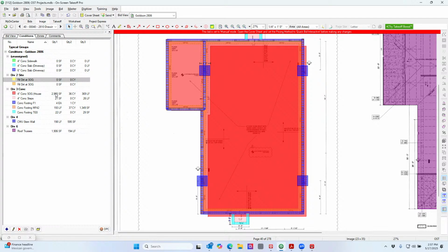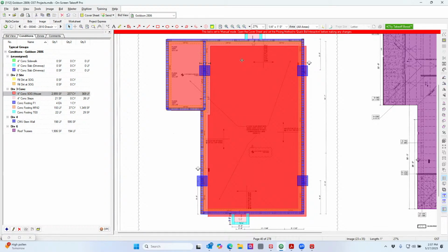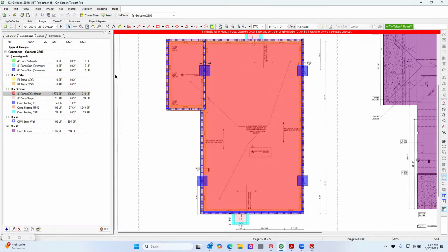But basically we know, for instance, we have about 3,000 square feet, and it's 2 foot 2 inches deep. Let me just do it here real quick. So if I had 2 foot 2 inches, and let me remove this one, it would be 126 yards roughly. Actually, it would be 111 to be precise. So 111 yards of dirt. Then we'll have to put the dirt here too. So I think that was right, 126. Yeah, 126 will be the actual number.